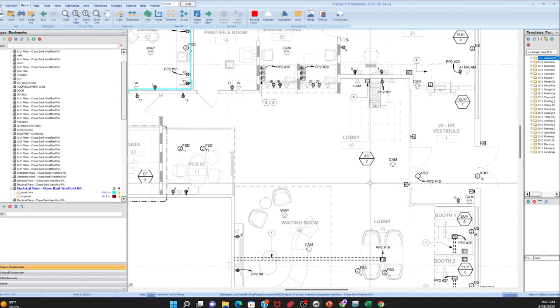Schedule and make sure he doesn't need a lift or something. Well, you know what? That's a good thing too. You said that because all of my estimates have a standard place for a lift. They're going to go higher than 6 feet anyway, so if they go higher than 6 feet, they have to have some way to get up there. So that's kind of a standard item on our estimates that you'll see. The lift is standard. Overhead and profit is standard. We have a spot for the switchgear separate from the lighting package. And that's another thing.